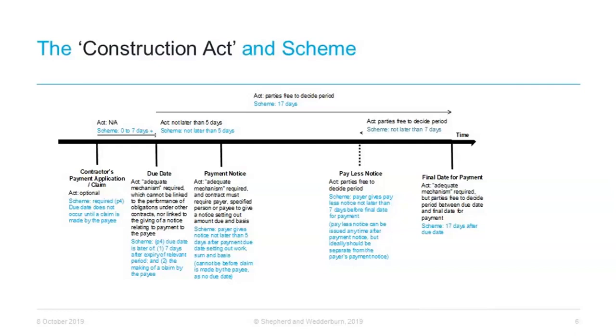It is important to remember that interim and final payments should be treated separately under your contract, as they have different valuation approaches under the Act and the scheme. Depending on which contract is being used, interim payments are calculated based on the value of the work to date, which may mean remeasuring works carried out in a particular period, i.e. in a remeasurable contract, or justifying completion of a certain task or activity if operating a payment milestone mechanism. In contrast, the final payment made under any construction contract is generally based on a full reconciliation of works carried out under the contract within the valuation rules for that type of contract.